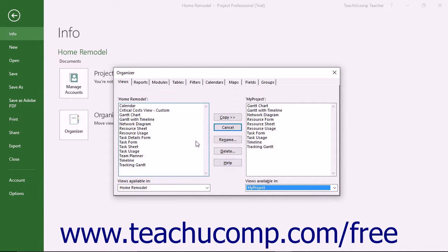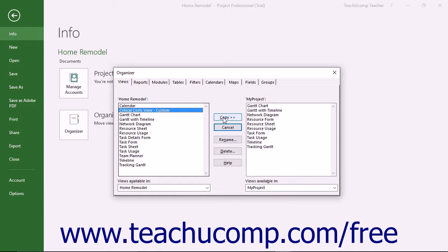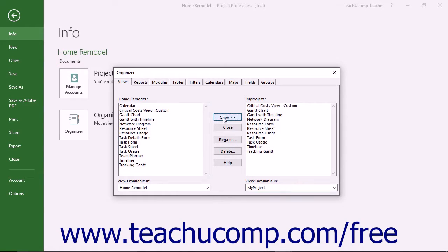You should then see the name of the object to transfer appear in the listing at the left side in the tab. Click the name of the specific object to transfer and then click the Copy button to copy the object into the listing at the right side of the tab.